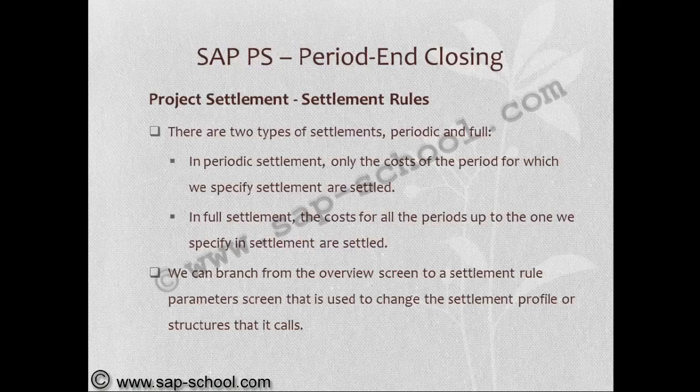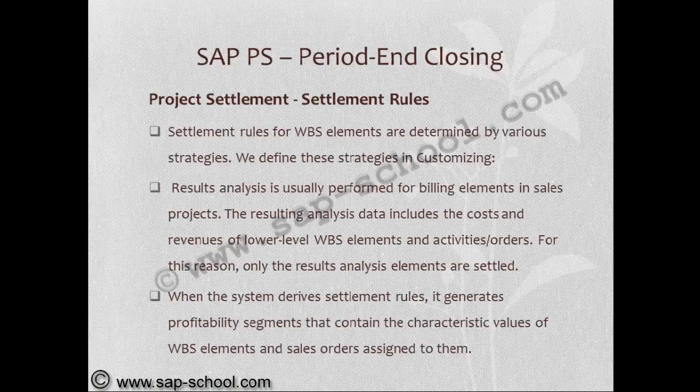We can branch from the overview screen to a settlement rule parameter screen that is used to change the settlement profile or structure that it calls. Settlement rules for WBS elements are determined by various strategies. We define these strategies in customizing.